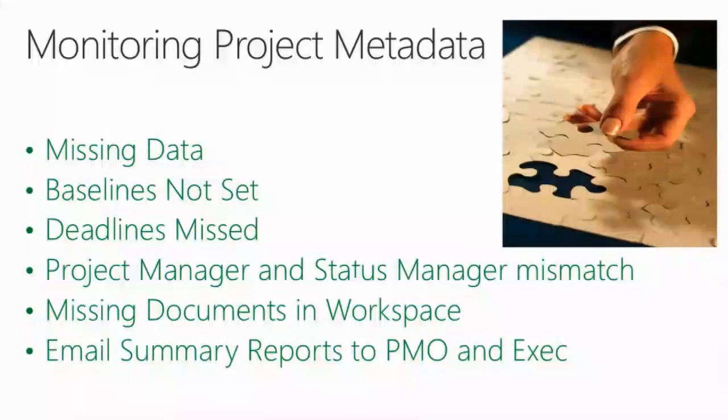Anyway, other things I look at is missing data in the project. What time do we have? 20 more minutes. Okay, good, we're right where I want to be. Looking for missing deadlines. If the governance requires deadlines, I'm a big proponent. If you have key milestones, you have deadlines associated with them, and you have a report that spits that out. Missing documents in workspaces, which was answering your question. Or maybe missing approvals.